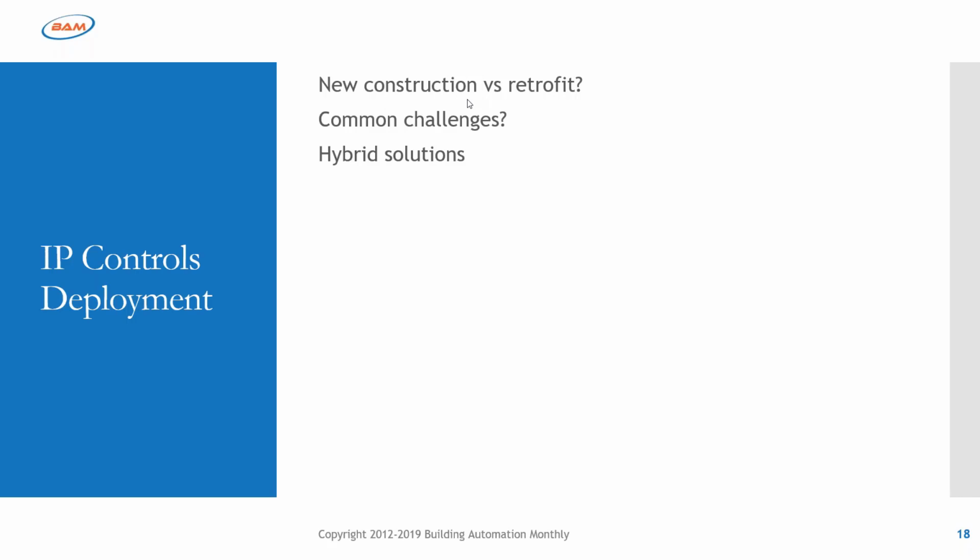How do we deal with new construction, especially since IT is usually going to be the last thing onto the job site? And quite often, the general and the mechanical really don't want to let us talk to the customers. So because of that, how are we going to coordinate any of this? How do we deal with this? Well, the main challenge up front is commissioning all of our controls, making sure they all communicate, making sure they all work. Because in order for us to do that, we've typically thought, hey, we need an IT network. Well, fortunately for us, there are industrial solutions to our problem.